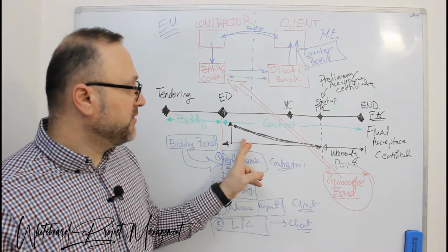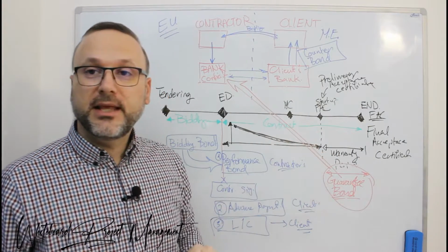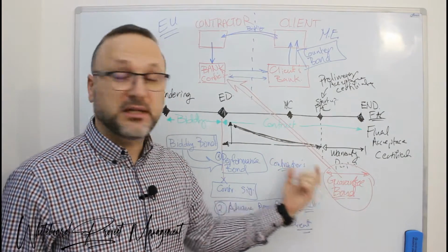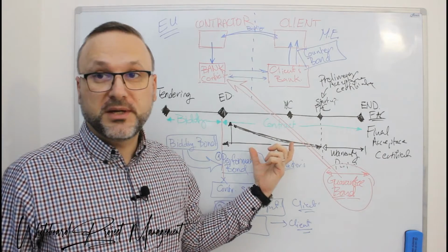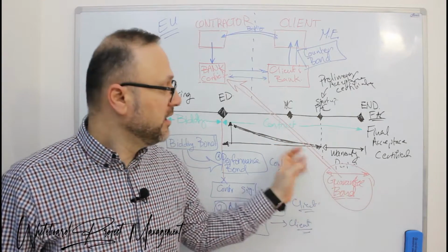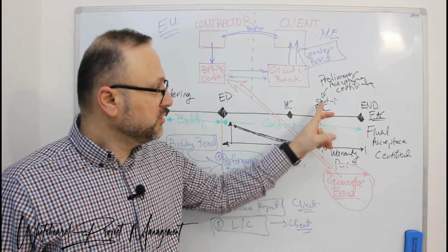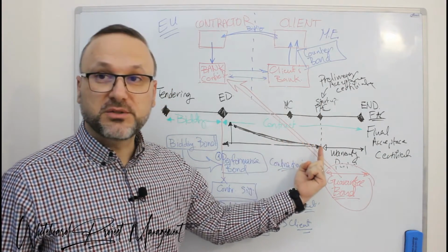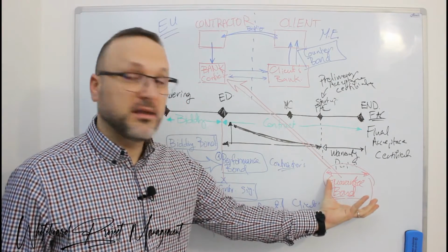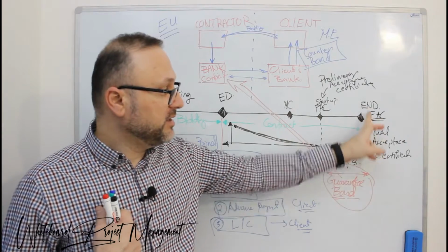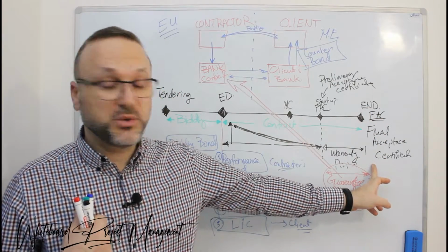Means I have here milestones, and from each milestone I will deduct, let's say, 2% to have it as a warranty. And once we are reaching the PAC, I have deducted 2% from each milestone, and I am keeping it as a client. I'm keeping it up to the end, and here I will release the payment for you.